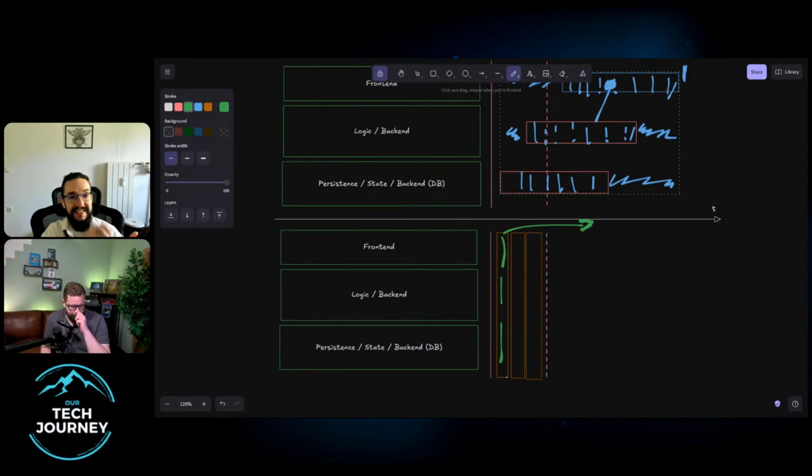Now, when it comes to slicing, there are multiple strategies to slicing. One vertical slicing strategy might be alongside TDD. If you're doing TDD, the zombies strategy, the ZOM, right? So the 0, 1, many. Hardware companies usually do the 0, 1, infinity, right? It's like, let's create a version of the UI that has no choice. Right? That would be 0.